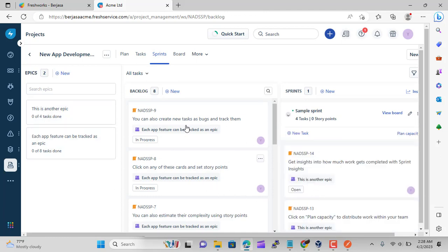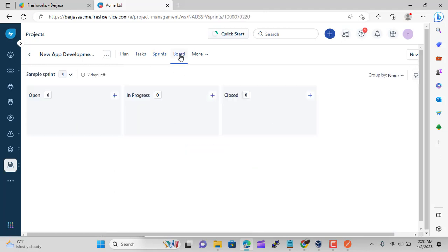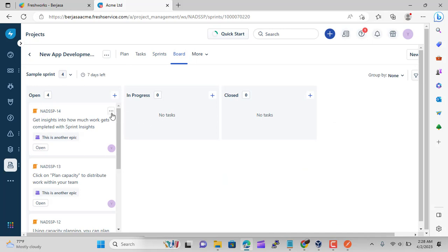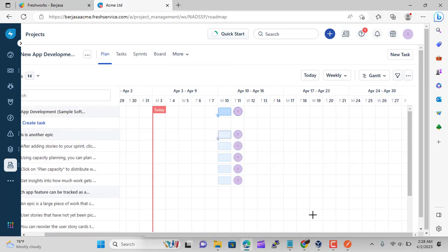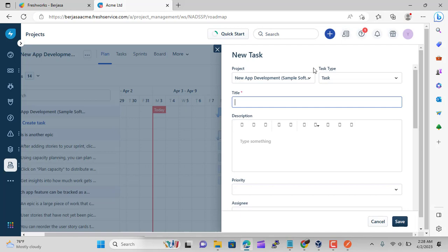Planning fields. These fields are added to ticket, problem, change, release, task, and project task forms when the workload module is enabled in an account, if they are not already present by default. Planned start date: the tentative date on which work will be started. Planned end date: the tentative date on which work will be completed. Planned effort: the estimated amount of time required to complete the work. Know more about automating the entry of planned start date and planned end date fields here.